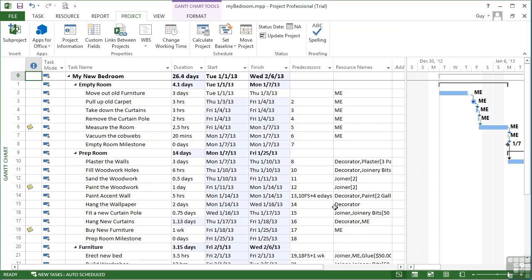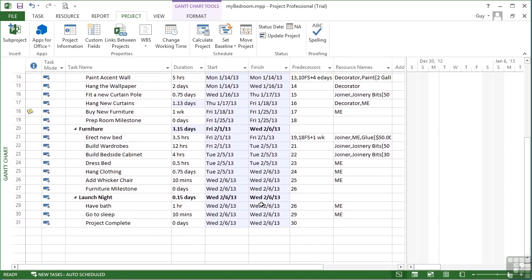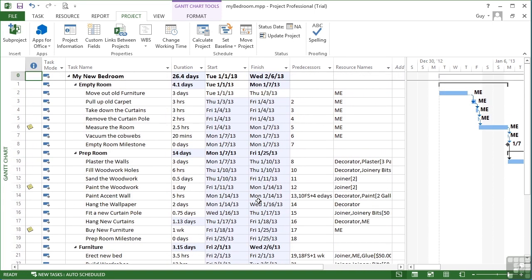When we say OK, there is a knock-on effect on the project. You can see things have slightly moved to the left. Certainly the longer ones, that's more obvious where I'm gaining that hour per day. And you can see the tasks that have been changed are all highlighted, which is pretty much every task because of the ability for me to work that extra hour.